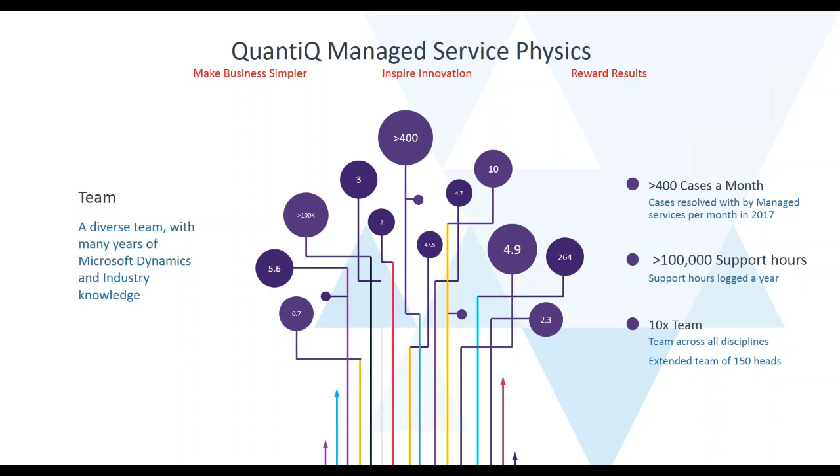This involves us bringing the managed services team onto the project in the deployment phase to assist in supporting our clients during the user acceptance testing. This building of the project team to include managed services means you already know the team who are going to support you going forwards. Also, they know you, so they're aware of your systems, your processes, and have had a good insight into how you work.